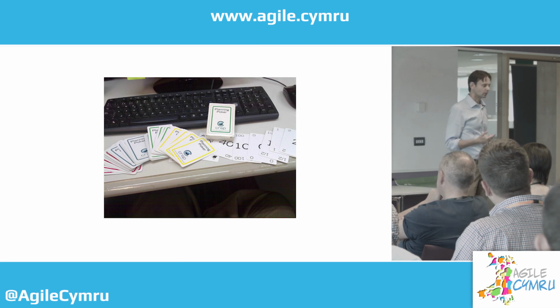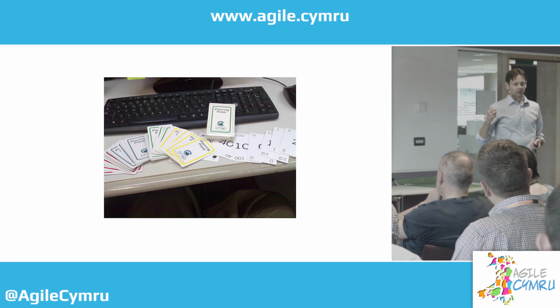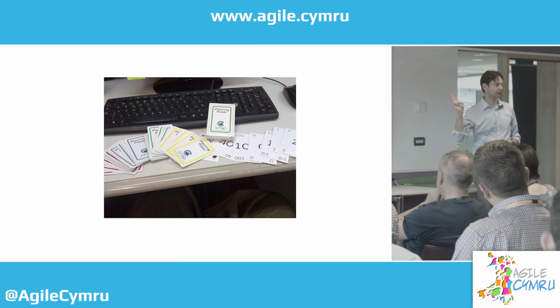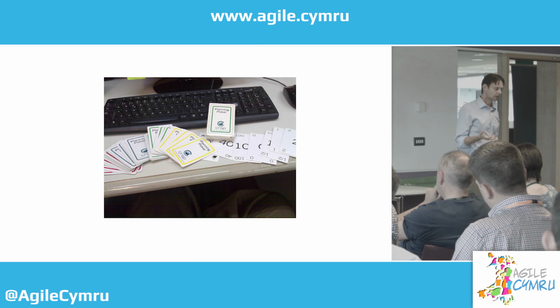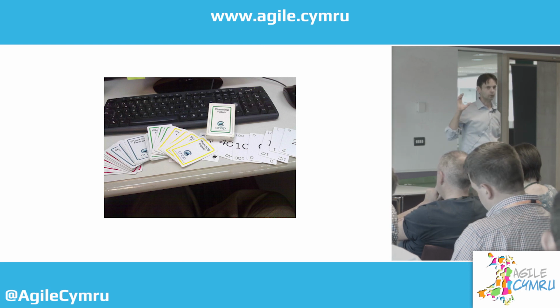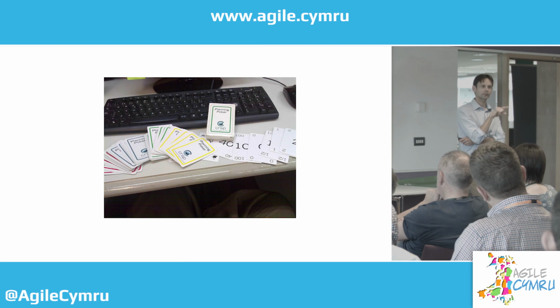So basically, there's a concept called anchoring, whereby if someone has influence or is admired, or unfortunately simply considered to be attractive in the room, people will tend to follow their steer. So if we hold up a 3 for the estimate, you're suddenly going to get a load of 3s. The bonkers thing about anchoring is there's a repeatable experiment where people are asked to price a bottle of wine. Before they're asked to price the bottle of wine, they're asked to recite the last 2 digits of their phone number. If those last 2 digits are low, price is low. If the last 2 digits are high, price is high.